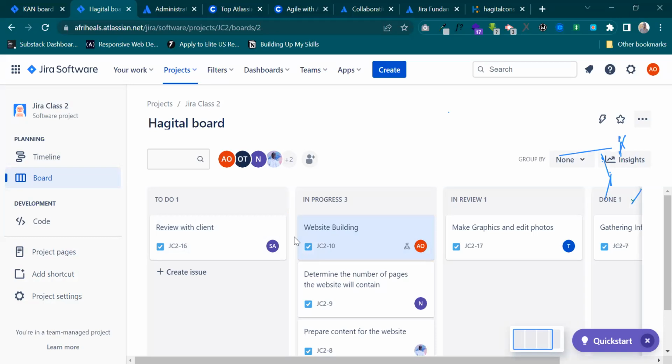So any adjustment that needed to be made would be done during the UI UX. But if the client didn't come or did not make any review request during that stage, and they want to come back at the end of it, we used to charge extra for that, because that is an extra trouble. It's just like